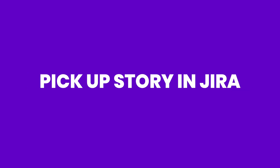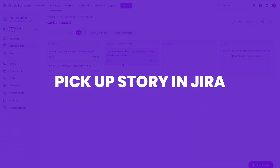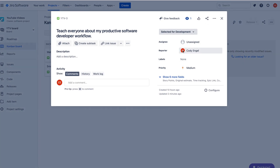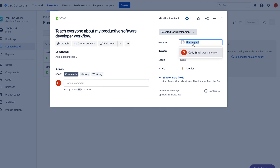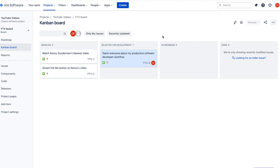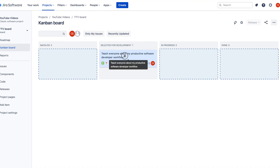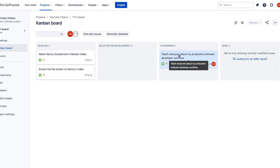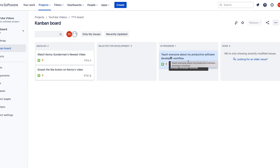The first thing I do that really kicks off my software developer workflow is I will pick up a story in JIRA. When I do this I will always assign the story to myself so that other people know that it's assigned to me. I will then move it into the in-progress swim lane so folks know that the story is now being worked on.